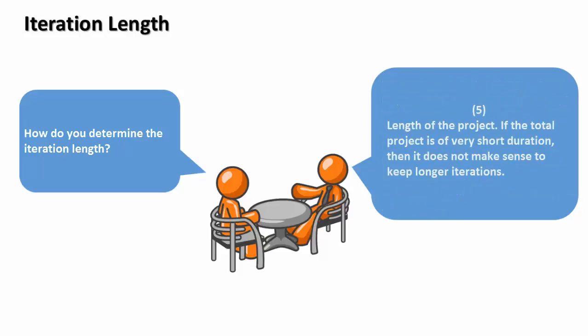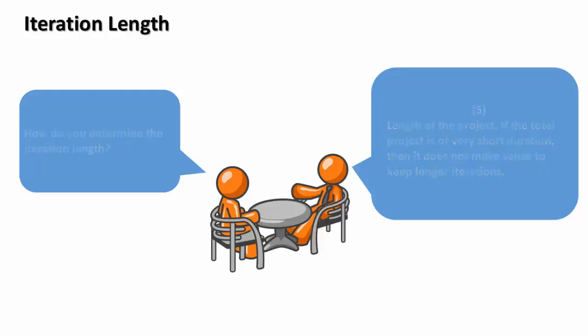Fifth: length of the project. If the total project is of very short duration, then it does not make sense to keep longer iterations.